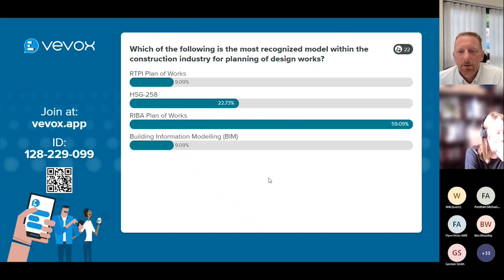Yeah, I think we definitely need to get involved in it. Where I work, we are heavily involved with RIBA plans already. We've got big projects and we tend to get involved really at stages 2, 3 and 4, a huge stage for LEV design. Stage 3, for example, is like concept design. You get your basic P&IDs, and then 4 will be detailed design. Then 5 is installation, and so on and so forth. But yeah, as an LEV community, there's no doubt about it. It's big, and we need to get involved more. Maybe it's something we need to get in the next LEV conference. Somebody that can explain it very well.